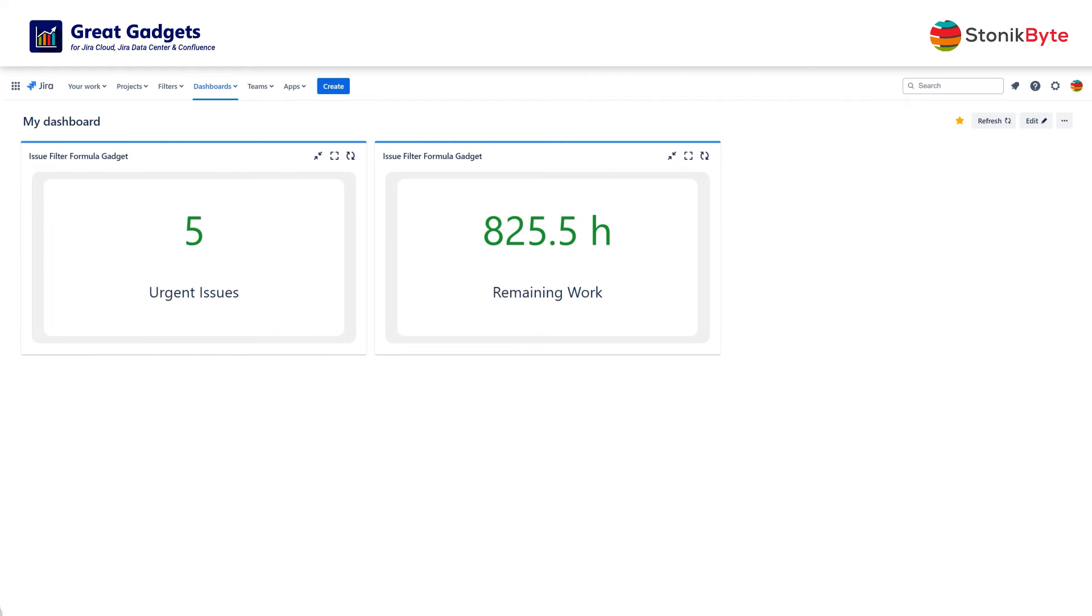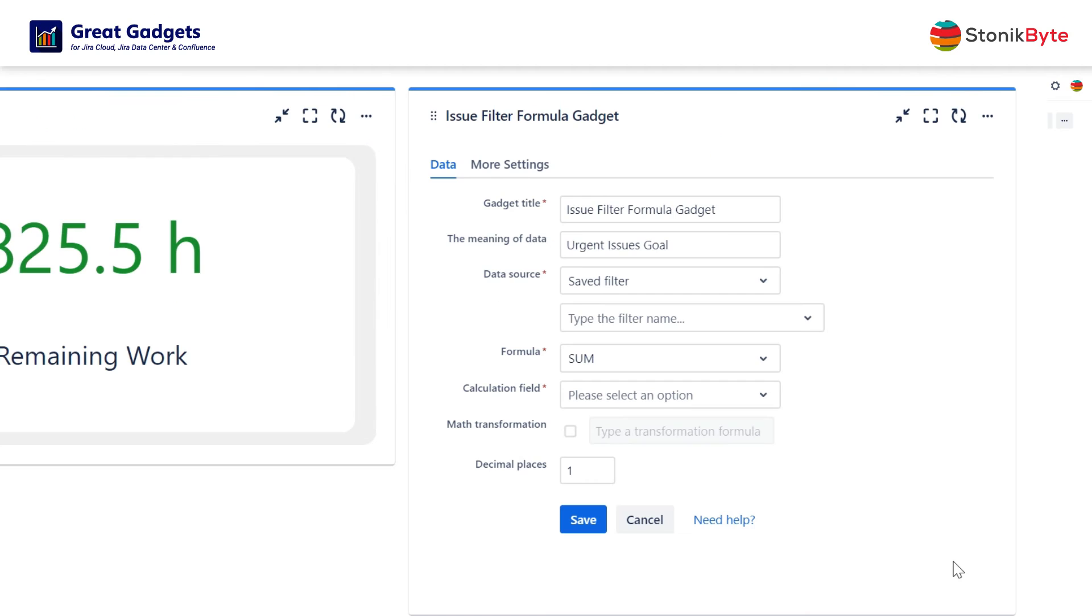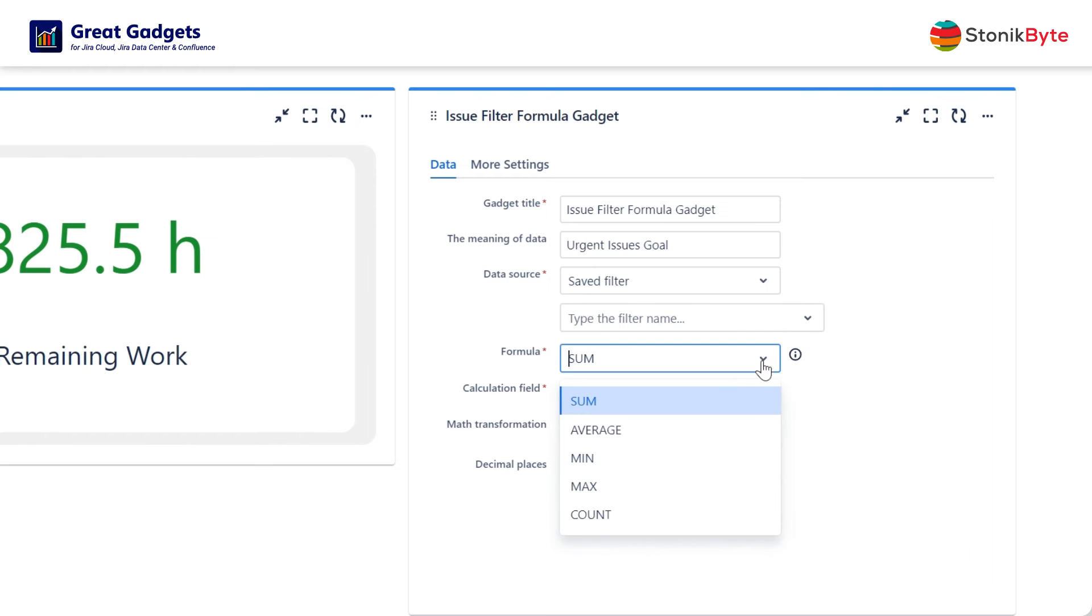Now let's say your team has a goal for no more than three urgent issues at a time. In this case, you can represent the progress towards this goal by configuring the gadget as a gauge chart.